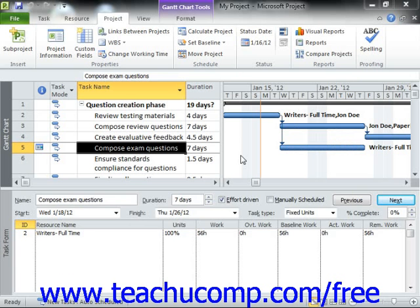Once you have saved your baseline copy and work has started on your project, you need to record the progress or actual work performed on the tasks within the project file. You can update the tasks individually, or you can mark multiple tasks complete as of a selected date. In this lesson, we will examine how to mark multiple tasks completed as of a specified date. You can use this feature when a project has completed 100% of the tasks on schedule as of a set date.